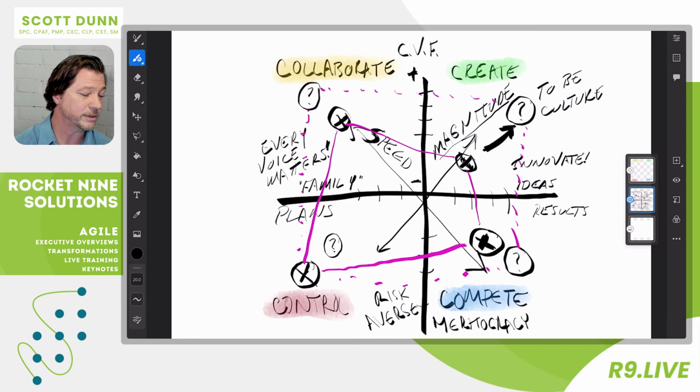Oh, a working agreement that the team gets to choose one of their own idea stories each sprint if they get the current sprint commitment done. Hey, why not try that? That's going to move you towards innovation. Is it right or wrong? It's right to get you there. Should another team do it that doesn't have that challenge? No. I don't want to copy and paste what other people are doing. Certainly don't want to copy and paste without knowledge, as Craig Larman says. So this gets you out of that kind of a bind.